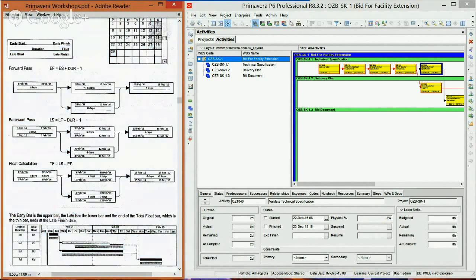Being that this is a shorter activity, it's going to have some kind of float in it, and it's not going to be the main driver for this activity. So being that this one ended on a later date, this activity isn't going to start until this has been completed. So 12, meaning it starts on the 15th, and with a 4 day duration, 1, 2, 3, 4, puts us at the 18th.